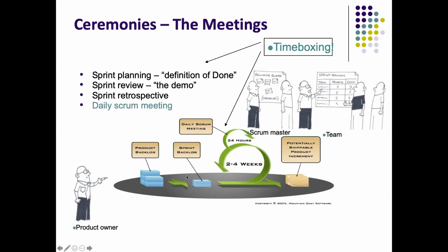The meeting in which you do that is called sprint planning, where you, as a Scrum team, get together and pick out the things you have in hand, and you will plan, and then define the definition of done, meaning when these things will be considered done. On top of that, you also do prioritization and estimation based upon the things in hand. All this happens in the sprint planning.